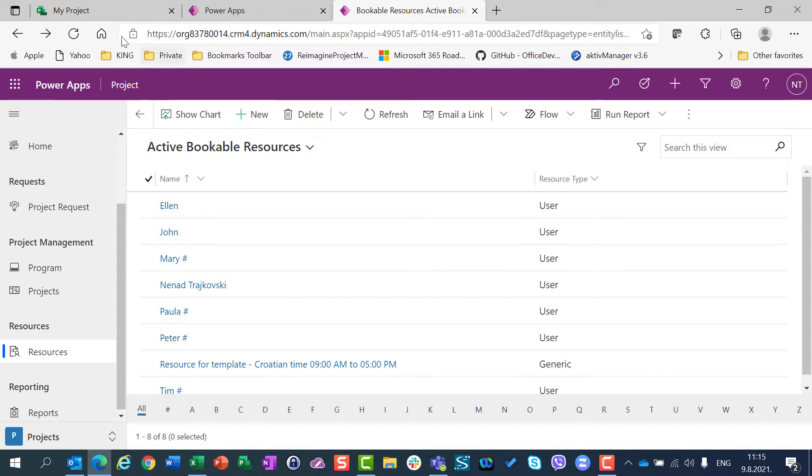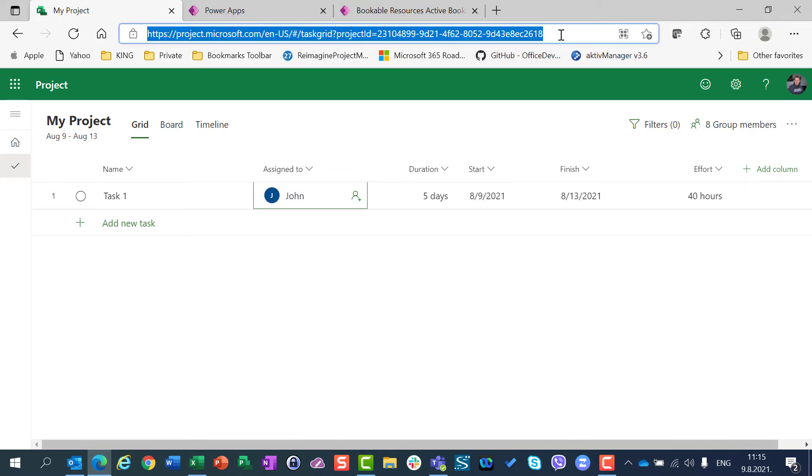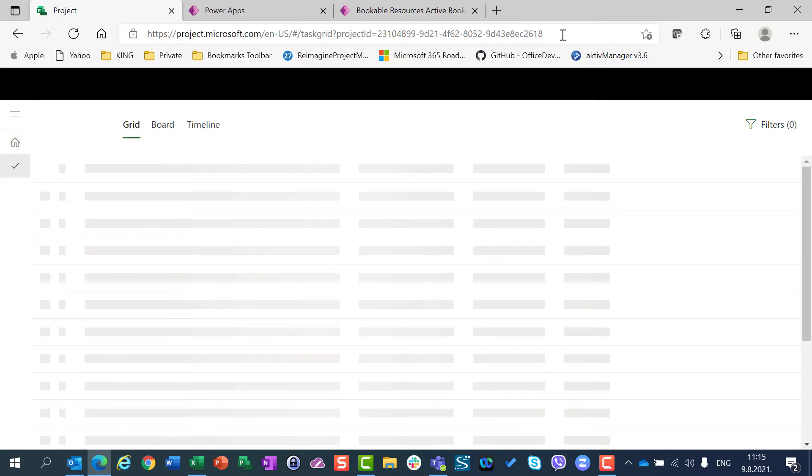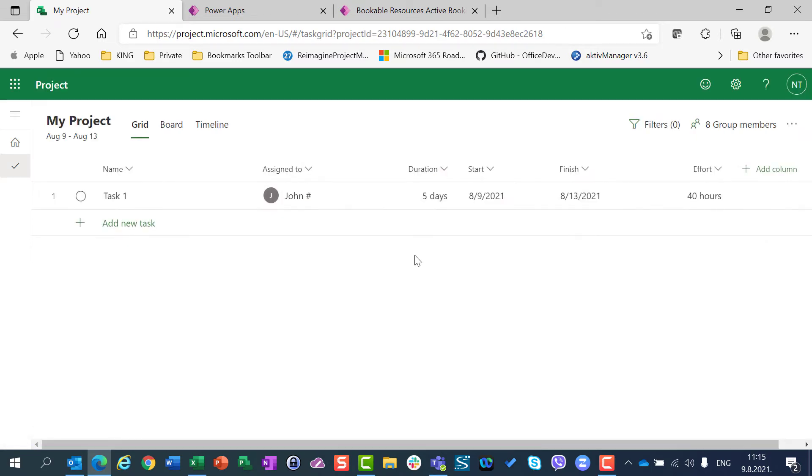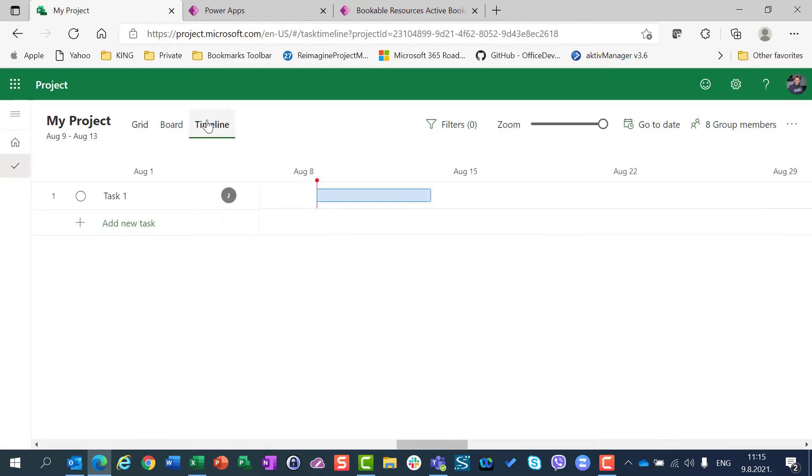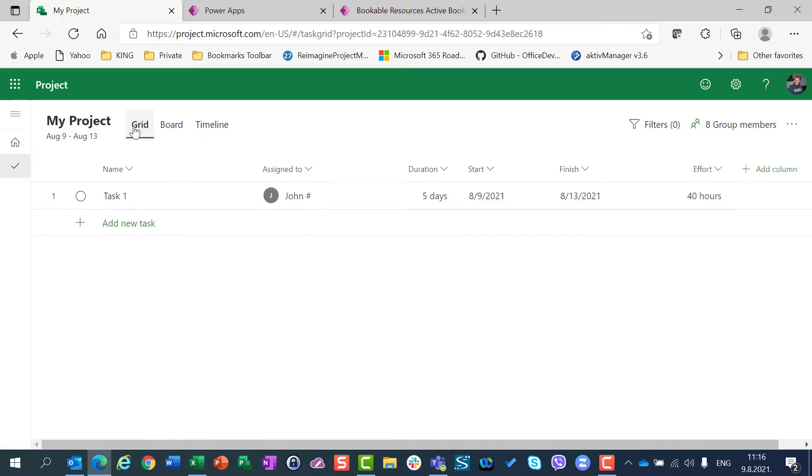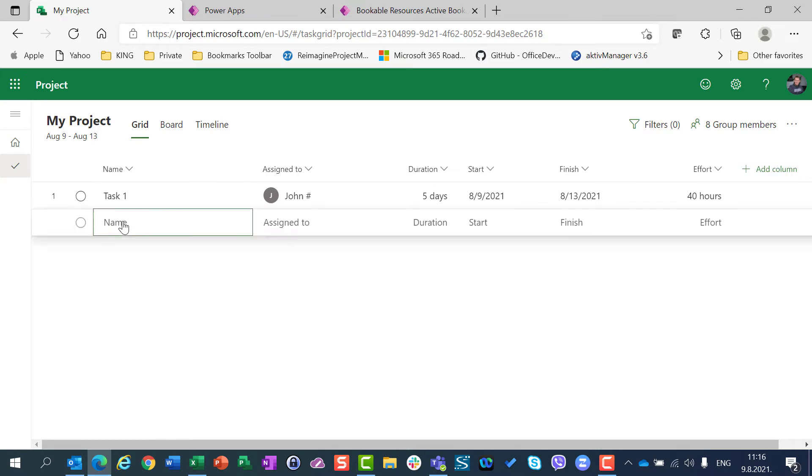And now, what is an interesting thing. If I go back in my project, I can refresh the whole project. And you will see that John has a vacation on 11th of August, and he should work only 32 hours. Why? Because he is going to work from Monday to Friday, but only 4 days he is going to work. He is not going to work on Wednesday. And obviously, he should have 32 hours work, not 40. Let me show you task 2.